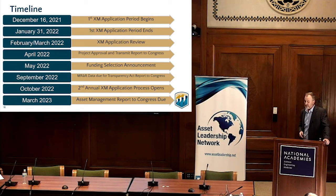And I think we were able to turn this around so quickly because we had that categorization data already, and we knew the projects that were high risk, that had a huge benefit, the A projects, the B projects, the C projects, let's fund those first, and the D's and the E's can wait. They can be a lower priority. So we were in a great place going into this because of asset management practices.